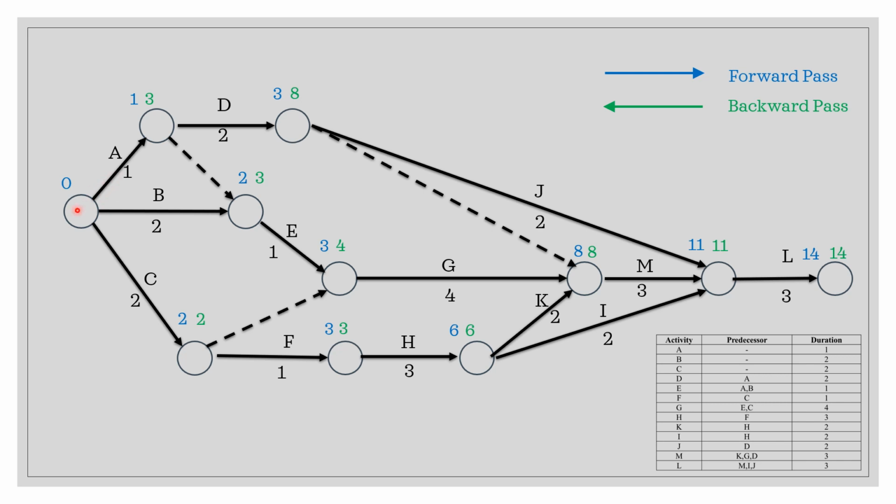Yes, because if you want to complete this early start, early finish, late start, and late finish, you have to consider activity A, activity B, and activity C. So in this case, the smallest number is from activity C. So you need to make sure that you get back the zero value here.